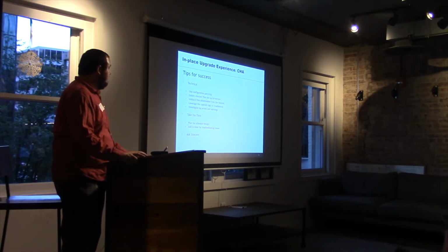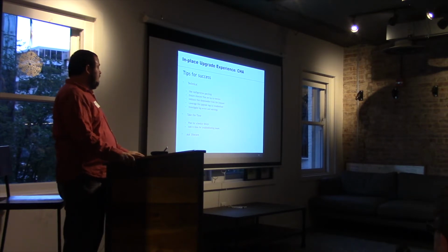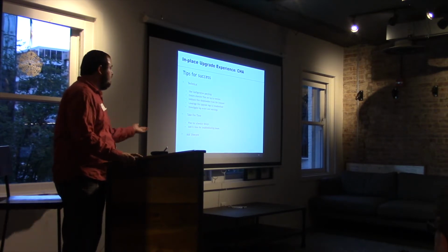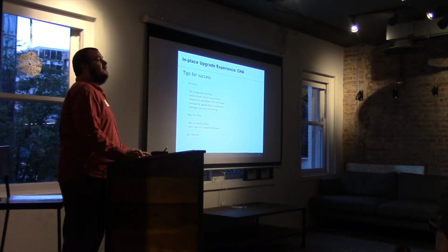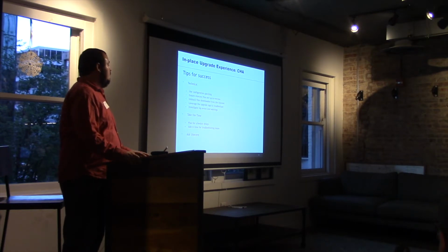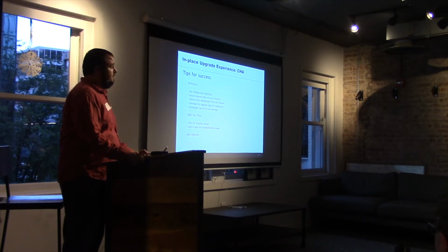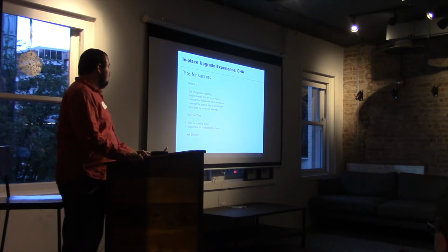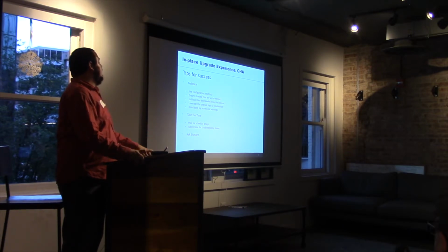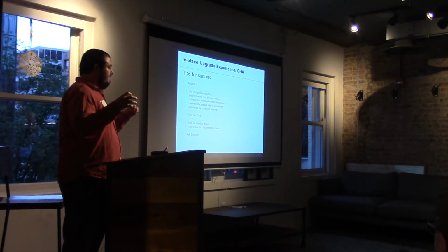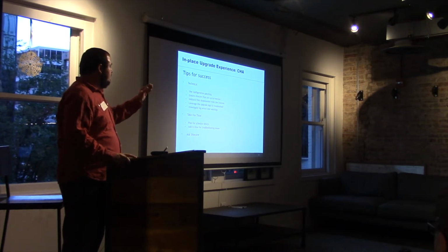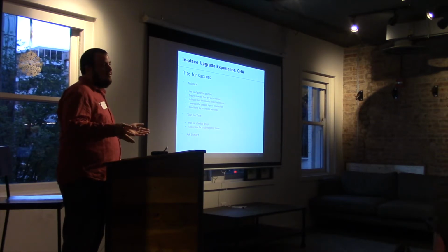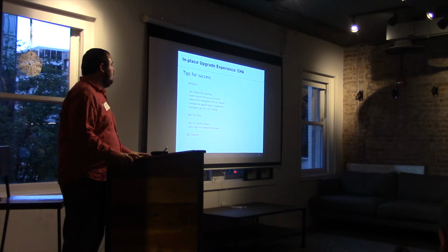Next major point is take the time. Make sure you plan for schedule delays. Unexpected issues are probably going to come up. And the more complex your site is, the more modules, the more customizations you have, you just want to make sure that you have enough buffer to deal with those sorts of issues. Add in time for troubleshooting issues. This is similar to what I was just saying, but make sure that you have not just schedule, because before we were talking about schedule, this is hours. Add hours to your project to make sure that you have enough time to deal with these issues.